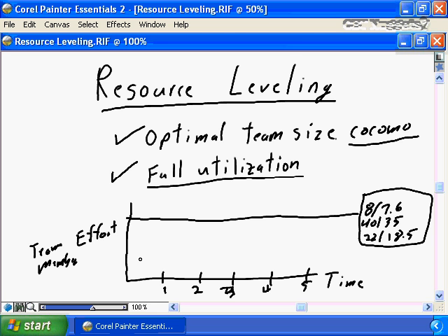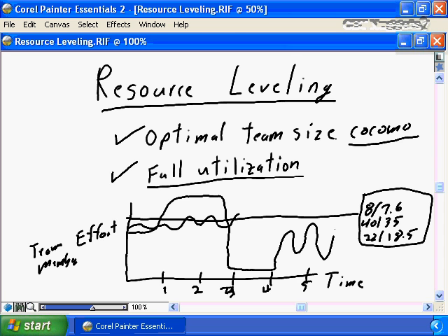And then you're going to look at each individual team member's utilization. If you have a team member that's flowing along at or about the effective level, that's good team utilization. But if you have a team member who's spiking, that starts off effectively used and then ramps up and becomes way overutilized, is working overtime, and then drops off and is working only part-time for a period of the project, and then ramps back up and ramps down and is a very spiky, very uncontrolled, if I can use that term, utilization, then that is not proper utilization of your resource.